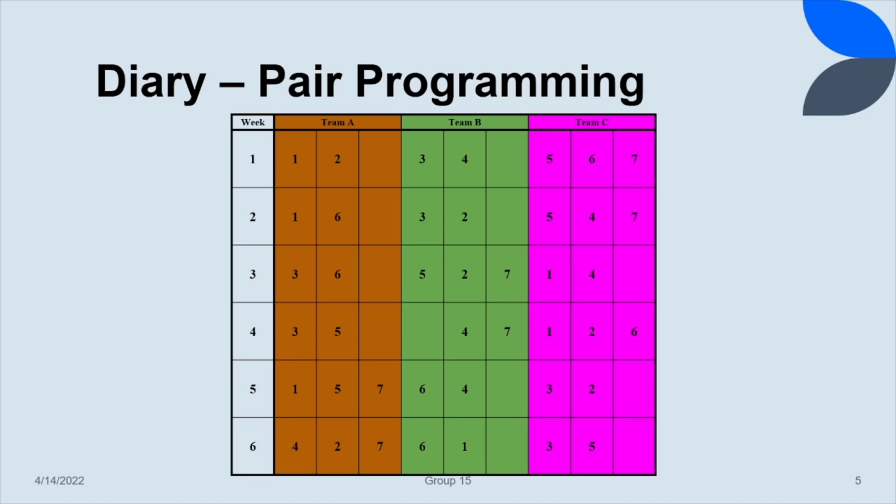Here, you can see an example of our pair programming implementation. The idea here was that one group member would have at least 1 week's experience with the component. After 2 weeks, this pair member would move on to the next component or next team. This ensured every team member worked on every component in our project, meaning that if there was an absence, we did not suffer as everybody understood all of the components. The project could continue to move forward. This table demonstrates how group members would move around each pair from week to week.